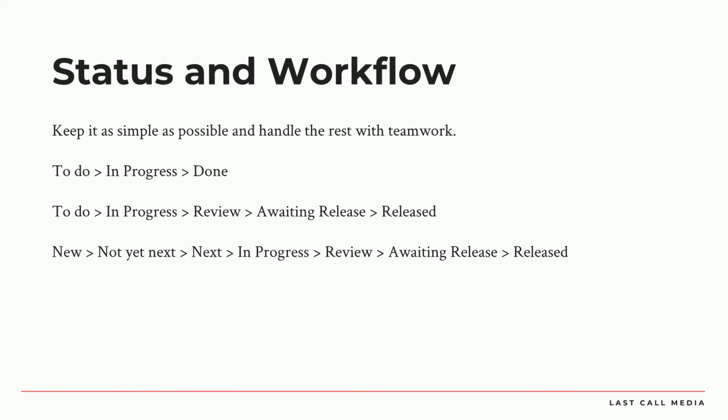Another one that's nice to add is, maybe you don't. And this is all team dependent. This is something that you decide as a team, and then if you think adding a status really would make sense to try, then try it and make sure to regroup back and see if it really improves things. So waiting release is another one. Maybe on a particular team, you're not ready yet to just deploy every tiny little issue right to production as you complete it. You might want to batch them up and have a release of a batch of issues.